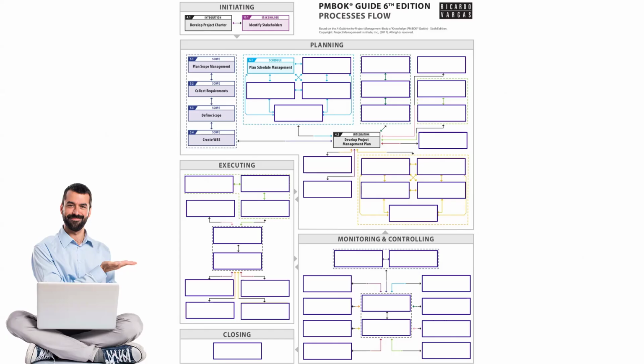But now, once the approach has been decided, I would go to the next process, and that is breaking it down, creating a work breakdown structure, which you might have been doing already. So work breakdown structure only comes after you do have a project scope. You do have an understanding of how you are going to go about it. Then you break it down into smaller and smaller parts until you reach a level which is called a work package level. I am not going down to the activity level because, as far as scope is concerned, we should not bother about the activities, because dealing with activities is the job of the subsequent processes.